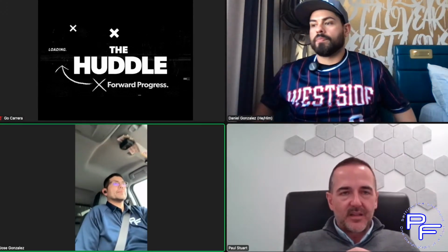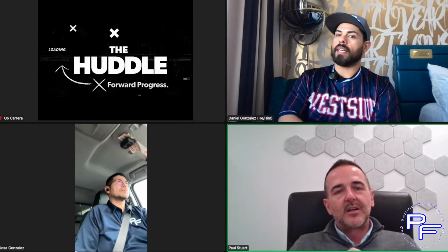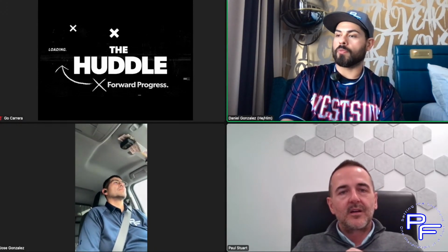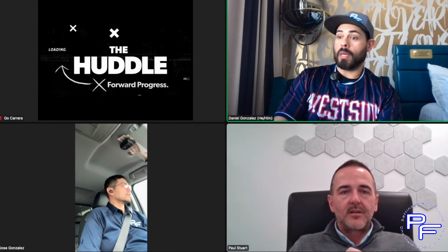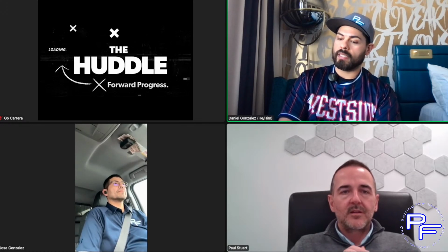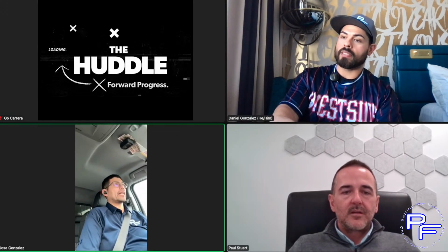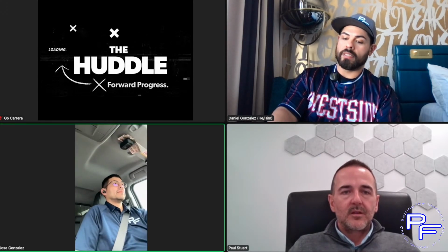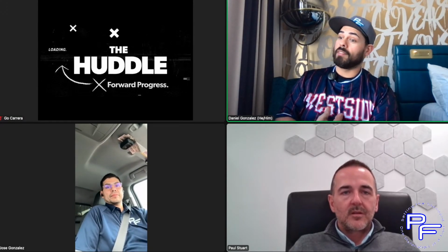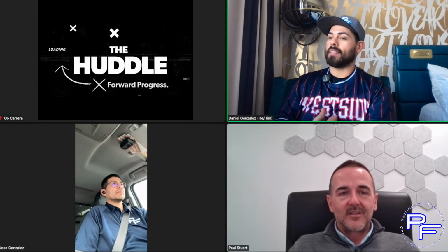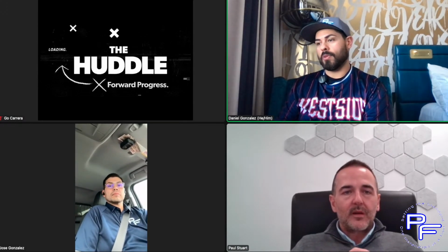Yeah. Cosmetic is a really kind of encompassing term to use, right. I think we got that from William Thornton from Target Sports. My brother talked to him on the phone a few times, and that's one of the things he said. He said, include in your bid that prep is cosmetic only, because anytime something structural happens, this concrete is chipping up, well, I don't do the concrete. I don't do anything structural. I'm just making the top coat pretty so that way it can accept flooring.